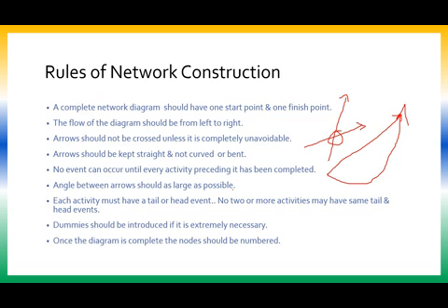Each activity must have a tail and a head event. No two or more activities may have the same tail and the same head events. As I said, concurrent activities, you should not have parallel activities. Between the same set of start event and end event, you cannot have multiple lines.